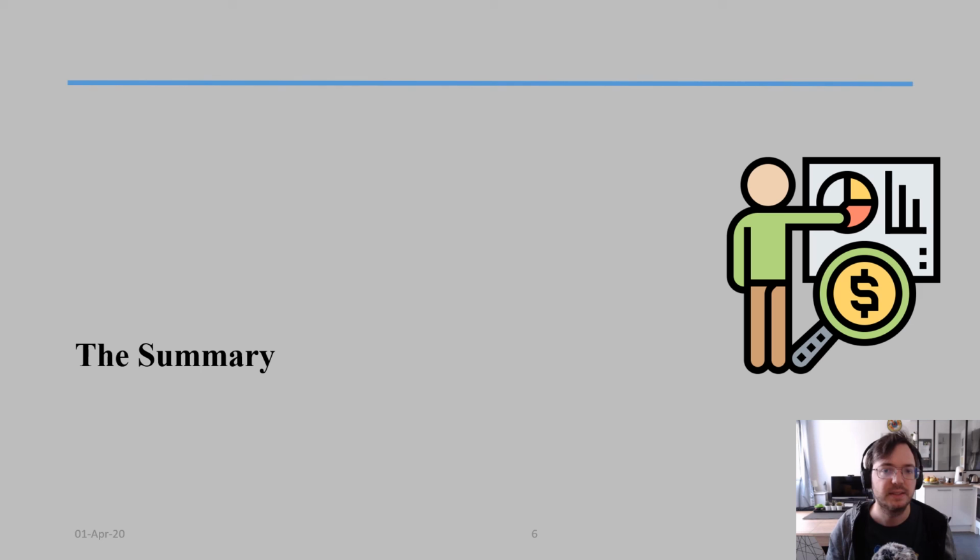So to summarize this video about meetings and issue management, remember, pulse meetings are just updates. Problem-solving meetings are to solve problems. We separate these two meetings in order to be as efficient as possible, so that people that don't have to be there are not there and can go back to work and actually generate value for the project.